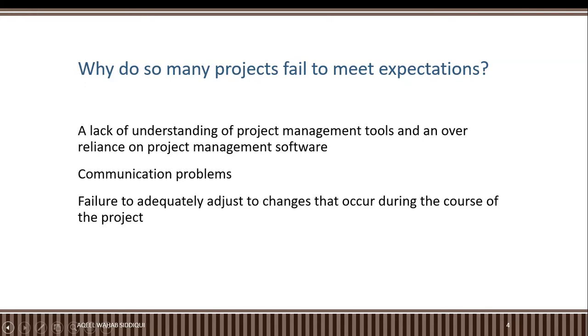I believe in the very first day of the project, what we see, that is change. And there are two types of changes, pitching a change and catching a change. Pitching a change is generated by the project team and catching a change comes from the project stakeholders. And it's the responsibility of a project manager.